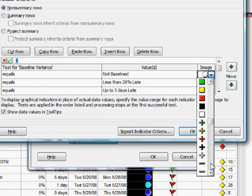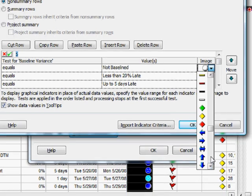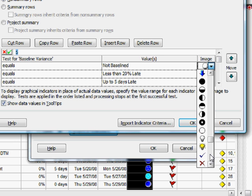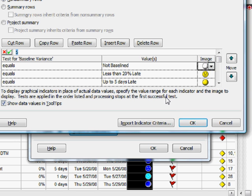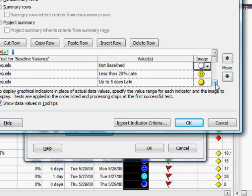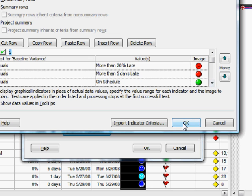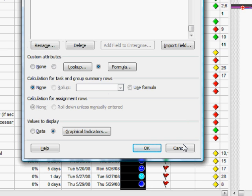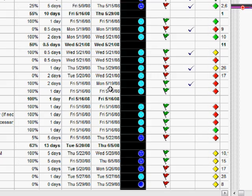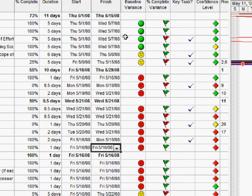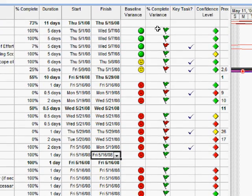And you'll see I have a variety of shapes and symbols including black and white indicators in case you have people that are going to look at your Gantt charts who are colorblind for example. And as we go down here you'll see the other indicators I chose for the various things that can be returned by that formula. So there we have an indicator based on a formula.